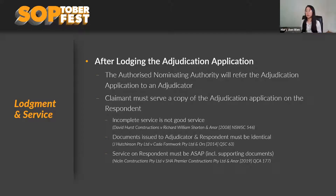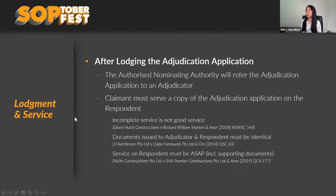We have seen provisions where the superintendent is the person designated to receive adjudication applications or respond to payment schedules under the contract. Make sure you check your contract provisions. Service will also be in parallel with the Corporations Act — you could be required to serve the registered business address, which might be the accountant's address, or personal service may be required. Check your contract to make sure all notice requirements are dealt with correctly.